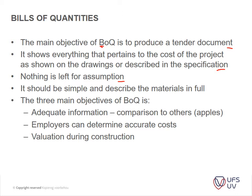It becomes a legal document, especially when doing payments, so you can go back and check what the contractor priced for and what he had to price for. It's not assumed that a chamfer, for instance, would be used — it's something described in your bills of quantities. It should be simple and described in materials in full, and you should try to keep it as simple as possible.